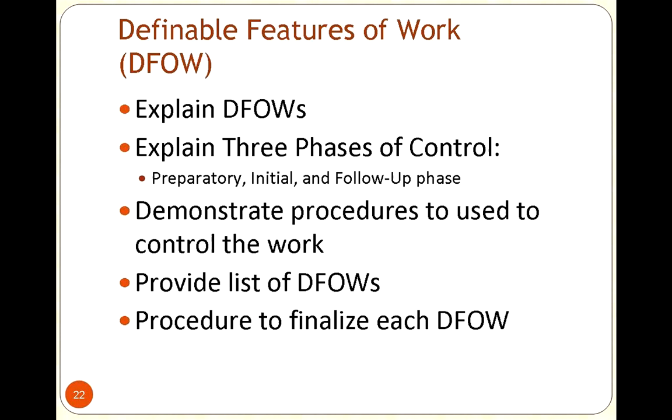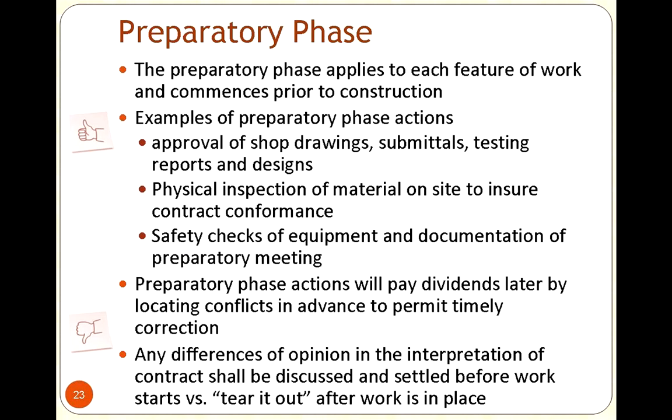So we're going to go into the big part of this now, what's called the three phases of work. And so we're going to define them as preparatory, initial, and follow-up. So we're going to start with preparatory because really that's where you start. We're preparing to get ready for this project.